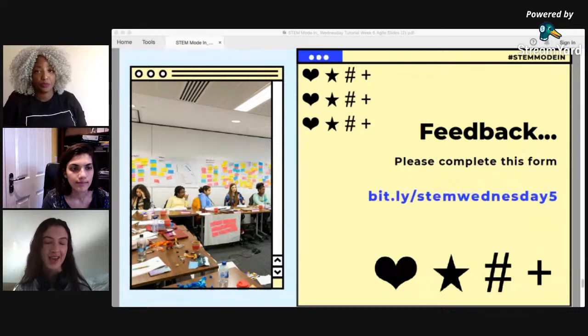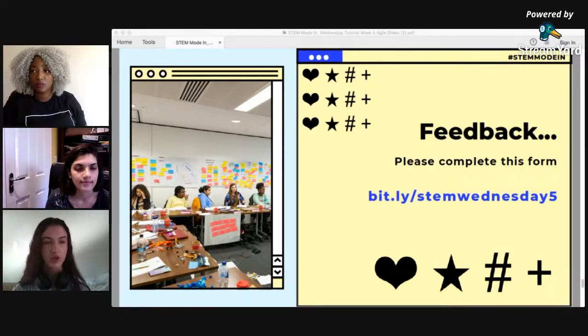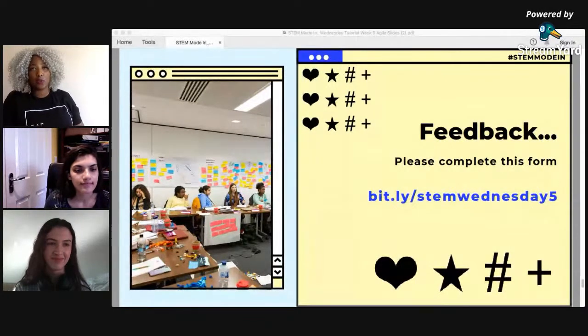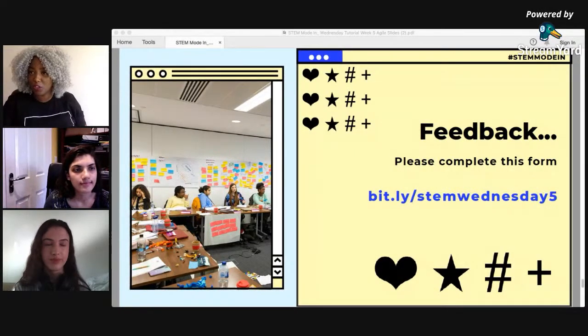Oh, sorry, go on, Karen. I was going to say, if it's the kind of project where you have physical materials and you have to build something, you don't want to waste resources when doing iterations. If you only have limited resources, then I think waterfall is better, where you plan it and make sure you get it right first time. But for non-physical projects, Agile is definitely the way forward. I think definitely, especially if it's expensive materials, right? Once you've ordered it, you've ordered it. Although I guess there's always the way out, which is you can sell stuff on, but on big projects they maybe don't do that.